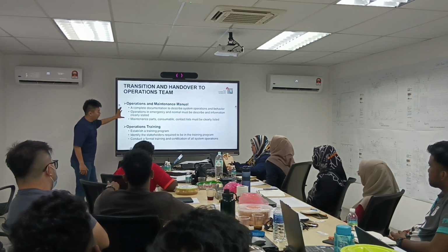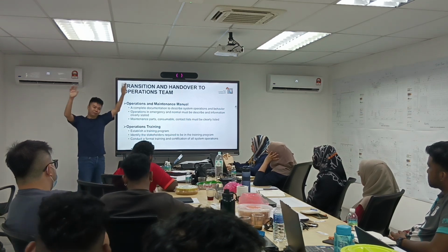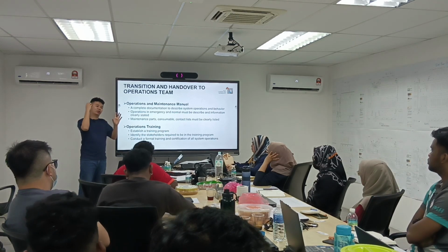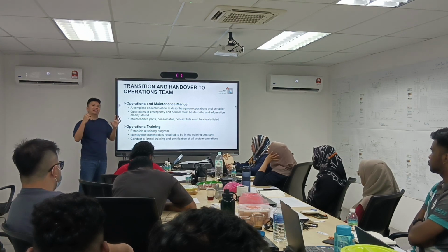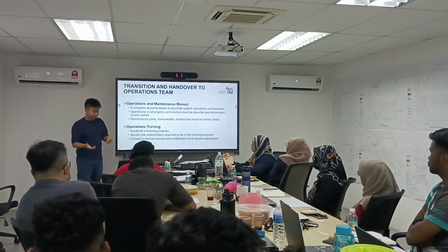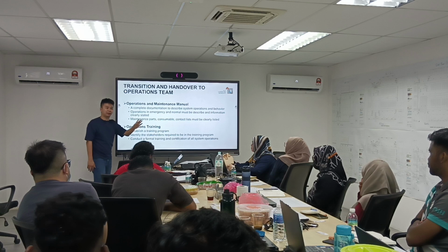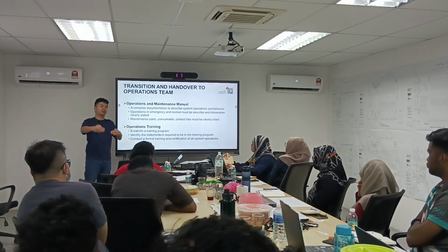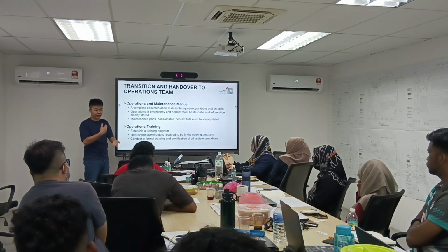So this O&M is basically just a document to describe the system, what are the consumable parts in the system that you need to stock up, who is your emergency contact, and in case of failure, which vendors you should call, etc. If you ask me, the O&M is supposed to be prepared by the project team. But for day one, because our team is rushing day 2 on site, our office team is actually helping to prepare the O&M.